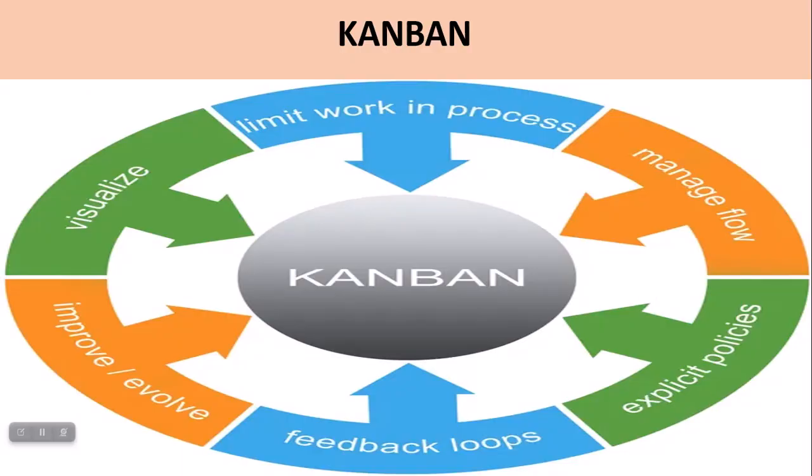In Kanban, there should be visualization. Visualize it. Limit work in progress. Then manage workflow. Explicit policies should be there. Feedback loops should be available. And there should be a strategy for improvement and evolvement.